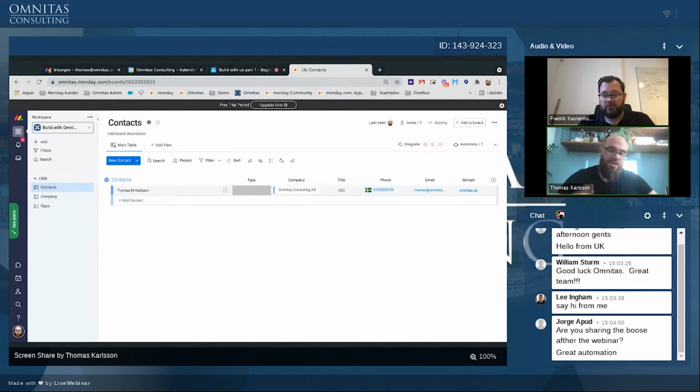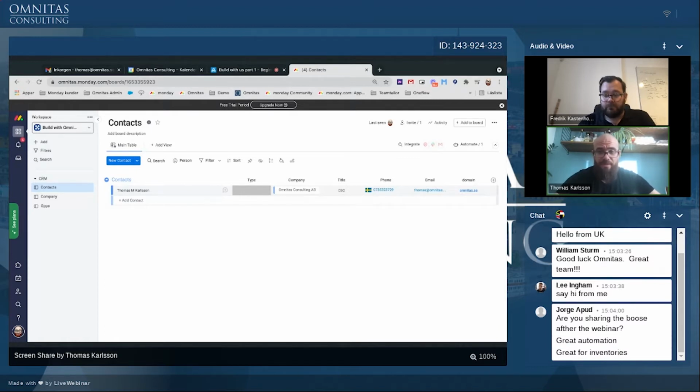So let's just talk about this automation for 2 seconds. If you're in a project overview and you have detailed projects planned and you want to match all of them and auto connect them, you can't do that from the project overview because it will stop at the first item it finds. But if you build this automation into the detailed project plan and have a dedicated column for the project name, all those items can be automatically connected to your project overview.